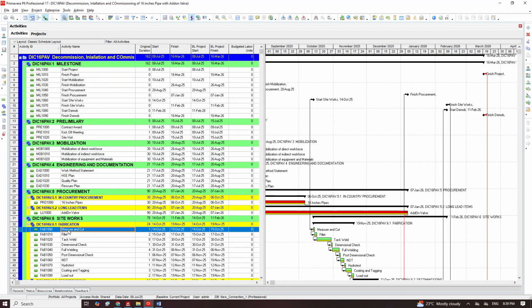Now, having understood how you can get most of these resources when you don't know. Okay, before I forget, let me also chip in another way. There's what we call a productivity list. Like for welding and fabrication, they have a template. We call it norm. You'll be hearing about welding norm or fabrication norm. It contains different sizes of pipe and how long it takes to cut it, the size, the schedule, which is the thickness of the pipe, and how long it will take one welder to each.